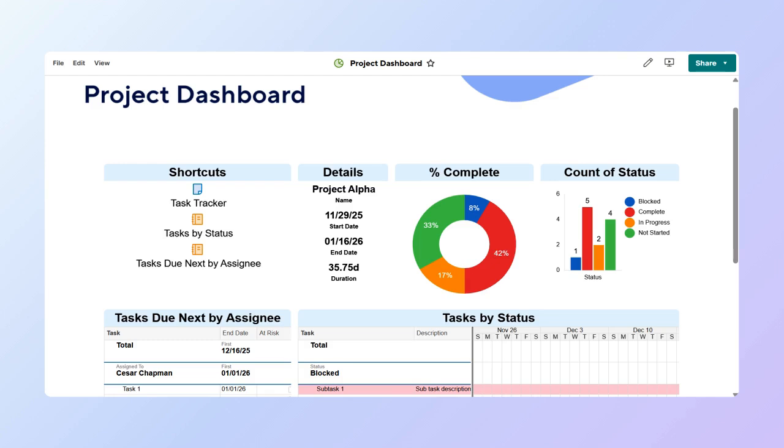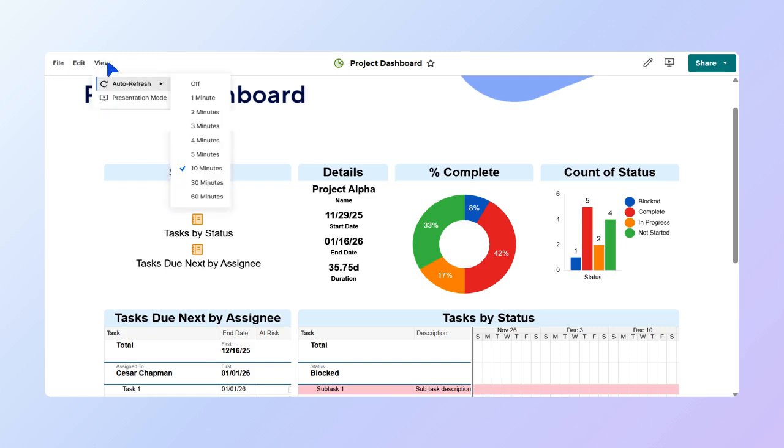Keep in mind that a published dashboard automatically refreshes every 10 minutes. To change this, select View, then Auto-Refresh, and choose your preference.